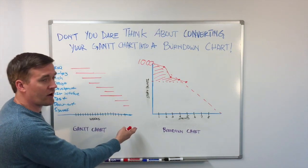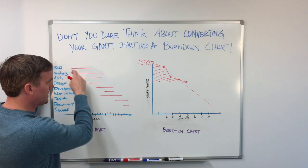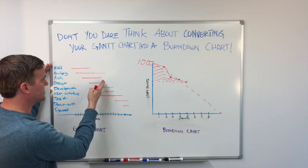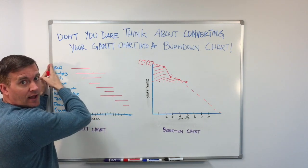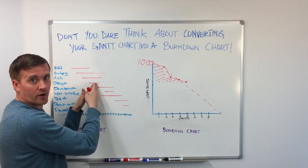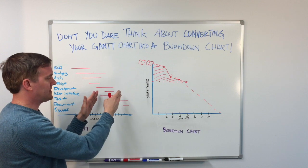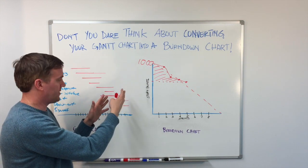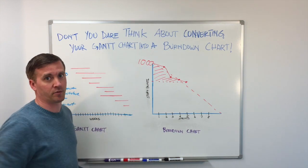In a traditional waterfall project being managed by a Gantt chart, when you get to the same point, all you have is a whole bunch of unfinished work and a lot of documentation. You don't really start getting into finishing the work until you're in the development, the testing, and the deployment phases of a traditional project.